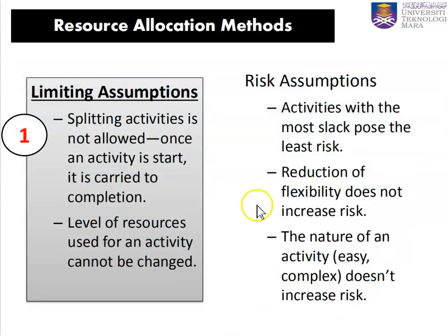So in allocating resources, we have some assumptions. The first is that splitting an activity is not allowed. We cannot split an activity, which means that we cannot delay the activities. We cannot start an activity, stop, pause, do other activities, and then start another activity again. And then the level of resources used for an activity cannot be changed.